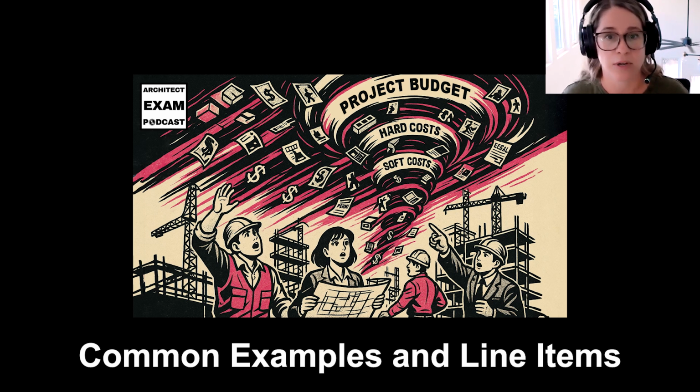Building systems, which are the functional guts of a building, like your HVAC systems, ductwork, electrical, lighting, plumbing, and fire protection, even the security and data systems of a building, all the wiring, pipes, ductwork, conduits that is needed for your building are a hard cost.